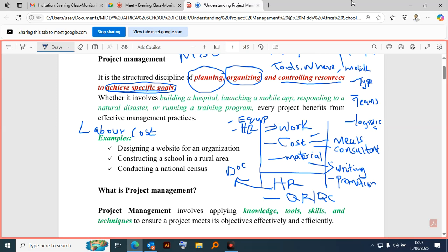Then you nominate one responsible person that will be accountable. Then when they finish the work again, that person will be responsible for ensuring whether they have collected all the materials and are safe or not. That person will be responsible for everything. I think that's the easiest way to control the material. But if we say everyone has collected, there may be a loss of something, a mistake.